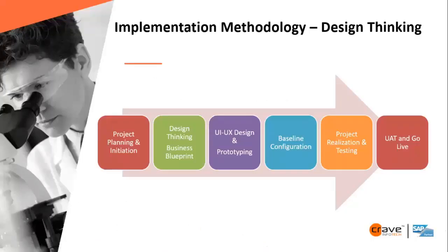Then for the implementation methodology, this is the methodology we are following in our product: the project initiation, then based on the customer requirement, we will do the design thinking and business blueprint. Then the UI UX design will be reviewed with the customer, then prototyping. Then if any configuration is involved, baseline configuration in the system. And because our application is totally configured, which I will show in the demo, then project realization and testing, and then UAT and go live. So this is our methodology.